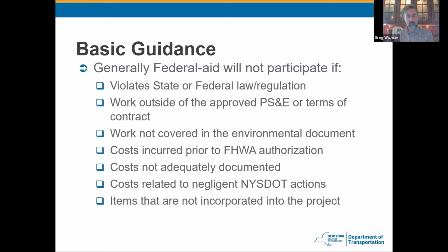The biggest topic, really, I would say, is the overarching environmental documentation that needs to be done to get your project to design approval and then into construction. You'll hear the term NEPA for short. That's the umbrella that all projects must follow with federal aid. So that's really the most important thing.